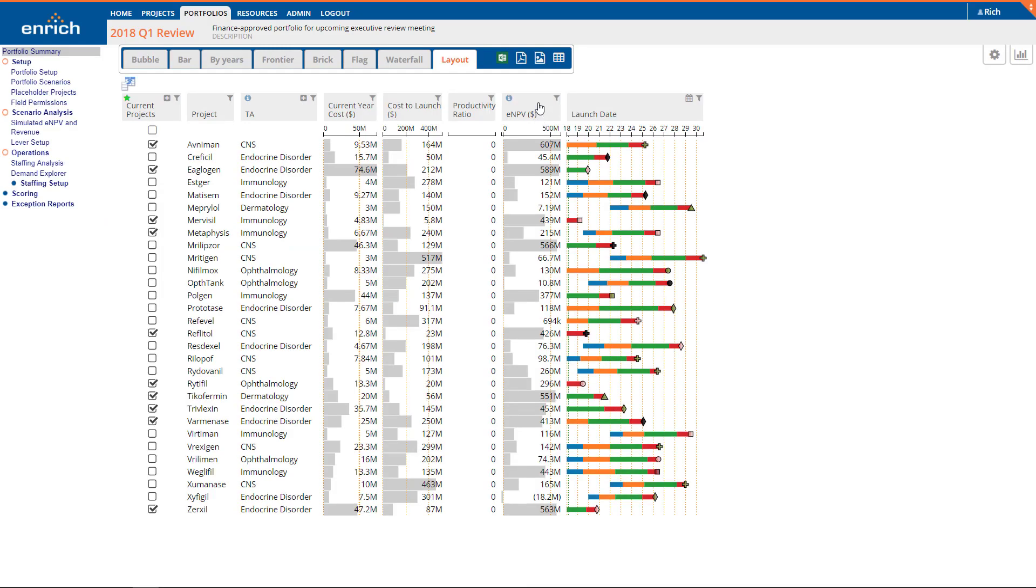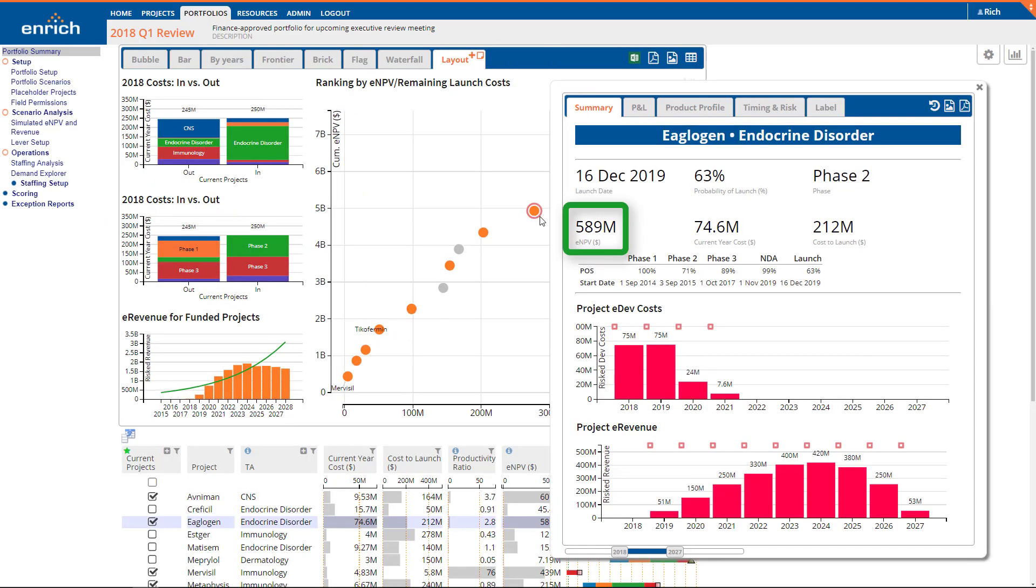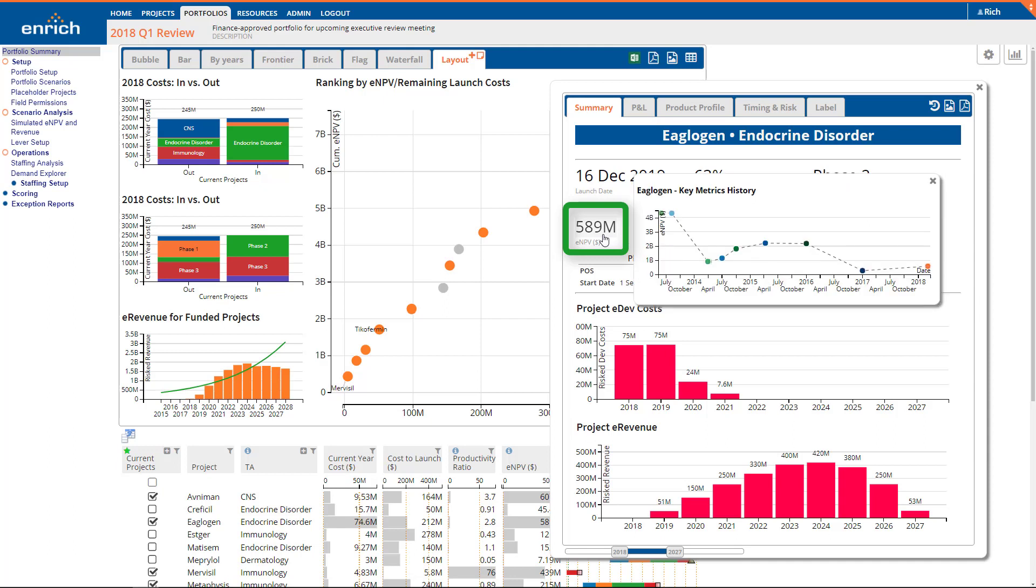Knowing the current project cost or project value is useful, but sometimes the change in value or cost since the last review has even more relevance to the decisions at hand. If you need to know how a project's value, cost, spend, or schedule has changed since the last budget cycle, project review, or portfolio meeting, you need variance analysis.